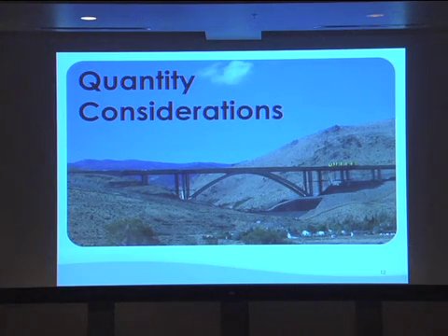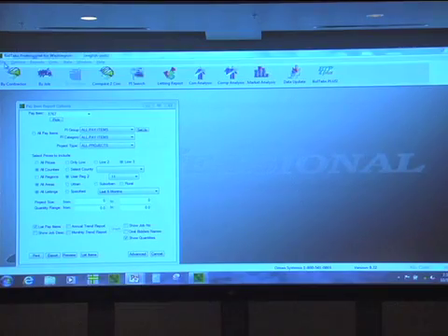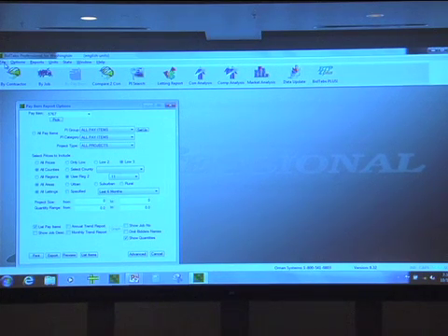So Tommy, show us how BidTab Pro can show us these different things. Okay. Well, we can definitely select quantities. So let's take this item 5767 and Blane, how many tons are you going to have? Let's just say 10,000 tons of HMA. Okay. So I'm going to probably put a range around that. Let's say 5,000 tons to about 15,000 tons should give me a pretty good idea. And I'm going to see what that looks like.